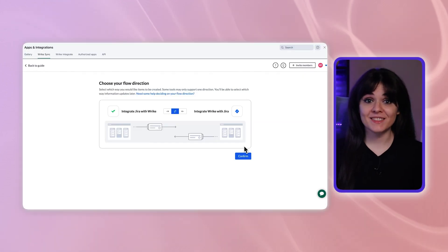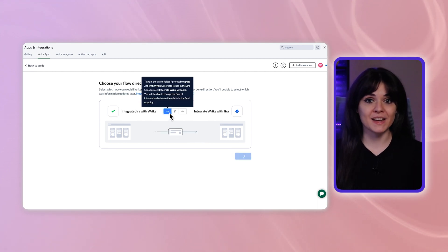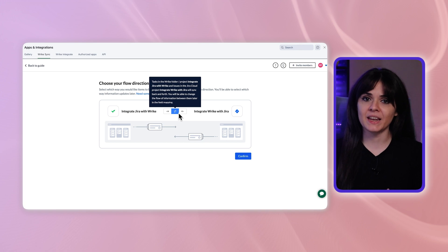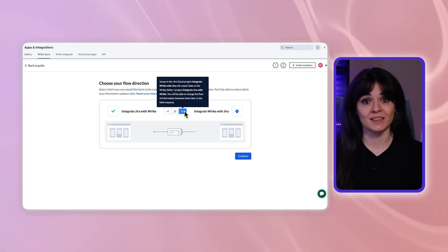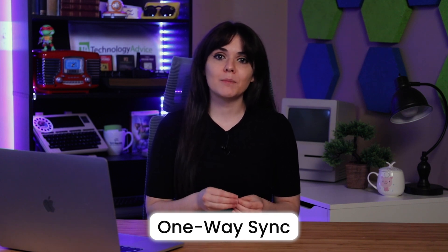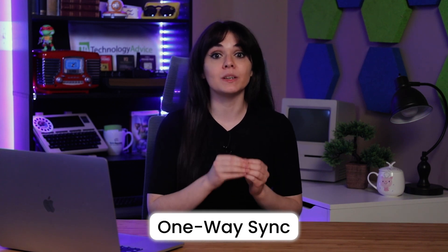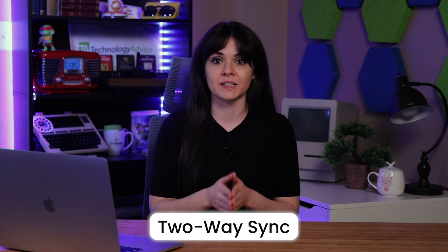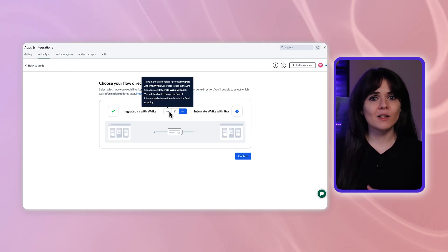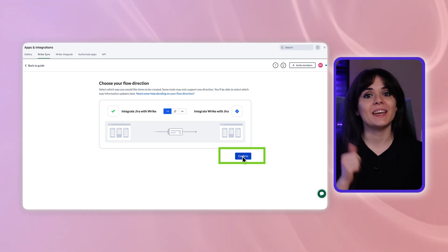Now that we've connected the apps, we need to determine what kind of flow we want. Your flow defines where tasks will be created and how each platform will communicate information. You can choose between one-way sync or two-way sync. In a one-way sync, tasks created in one app will be transferred automatically to the second app, but tasks created in the second app will not appear in the first one. A two-way sync allows tasks to be shared between apps regardless of where they were initially built. For this tutorial, I'm going to choose the one-way sync from Wrike to Jira. Once you choose your flow, hit confirm.